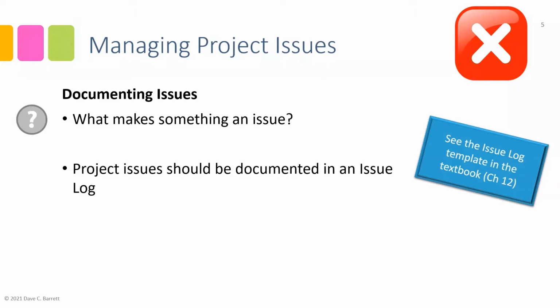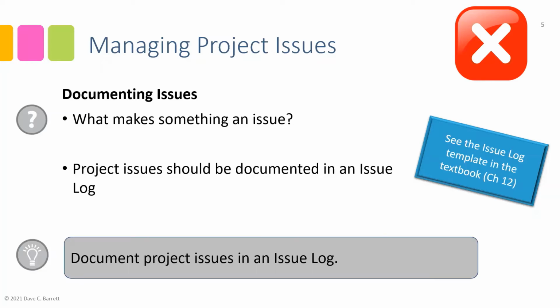Now, those that are new to project management often struggle with this concept. The idea is, well, why don't we just solve them as they come up? Why don't we just, instead of writing, fix them right away? Well, that's true if there's only one or two a day, or if they're very infrequent. That's possible, but on large and complex projects, oftentimes the issues occur faster than they can be resolved. They'll start to pile up. And so it's important to not forget about them and to store them somewhere. And that's where an issue log comes into play.